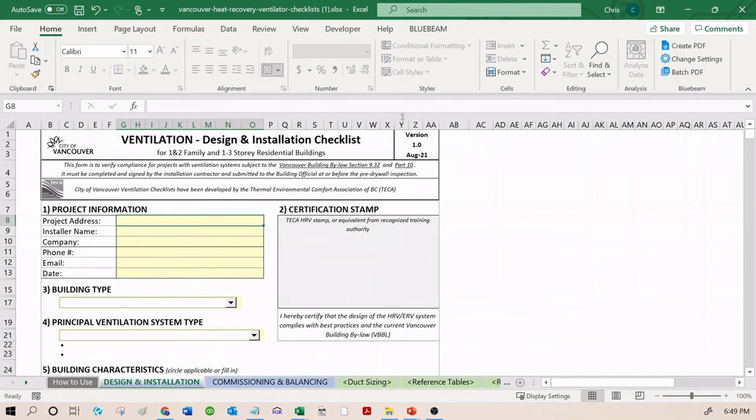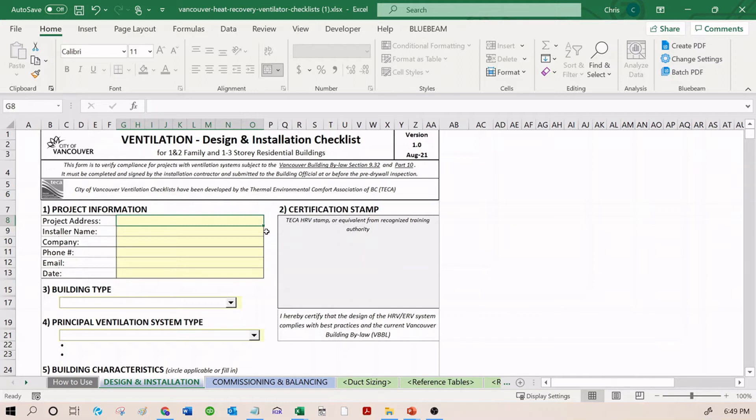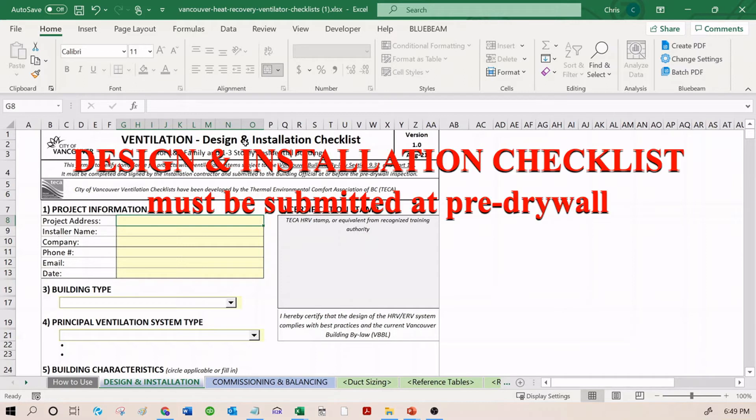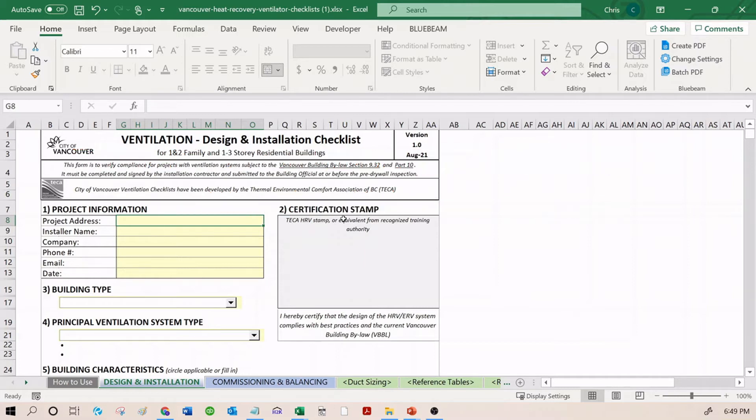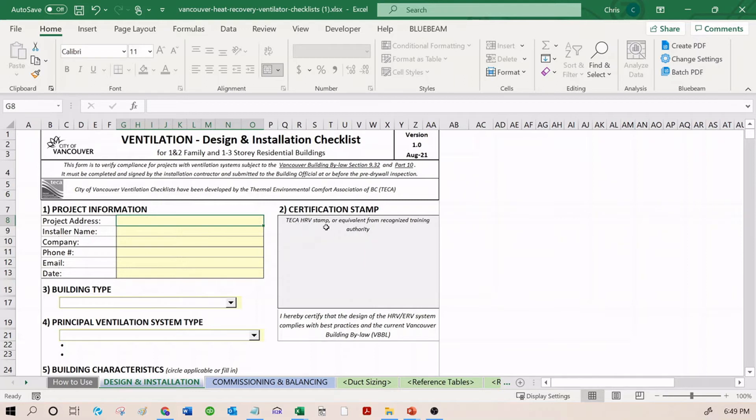Let's go through the Design and Installation checklist. We're going to go through pretty briefly. I'm not going to describe the process or give you education on the background. You're going to need to submit this checklist at the pre-drywall stage to the building inspector. In order to submit this checklist, you're going to have to stamp it. That's what goes right here in the stamp section. In order to be able to stamp it, you require the TECA HRV stamp or an equivalent from a recognized training authority.